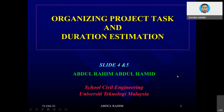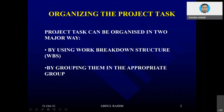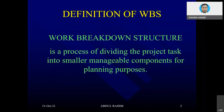We can organize the project and divide it using WBS — Work Breakdown Structure — by grouping activities into appropriate groups. Let's say you have a contract to build a school project. The school project by itself is one whole project development, but inside there could be many components. You want to divide them into smaller portions — that is what WBS is all about. You normally group them into a particular section, zone, building, etc.